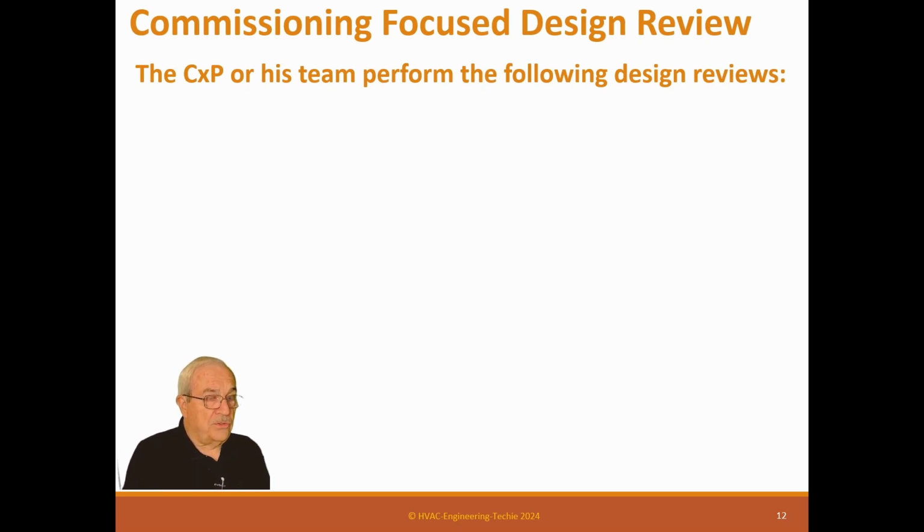So this is what you're doing. You're actually seeing, is everything on there? You're not doing a peer review. You're not evaluating the quality of the engineer's processes. That's his business, not yours. But you are making sure that everything's on the drawing and they do all match and the coordination is correct.